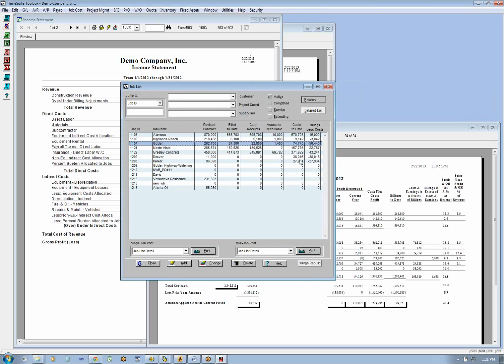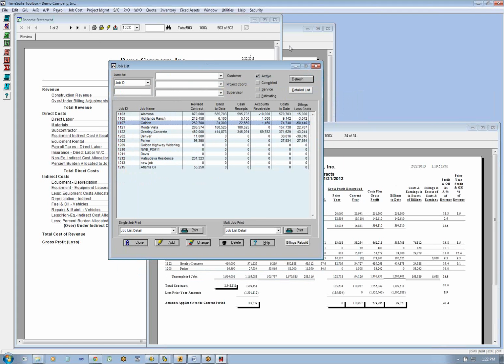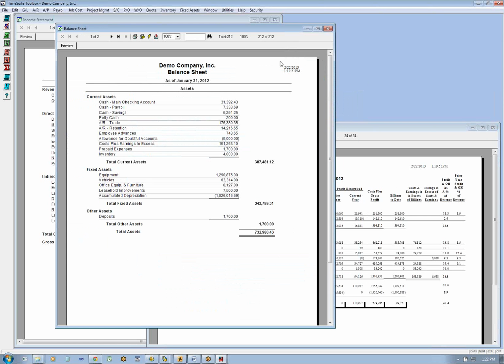So you identify maybe something came in on the 30th of the month. You sent an invoice out on the 31st. Let's say it came in on the 2nd, but it was dated the 30th. You sent the invoice out on the 1st, but the next day another invoice came in, so you put it in the cutoff date, and so then you would have under billings. So it's easy to get over under billings on your time and material job. And let's say it was a $30,000 invoice. Well, you could have a substantial underbilling.